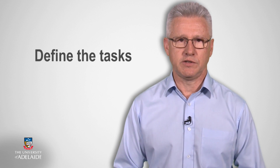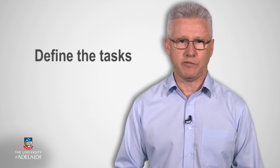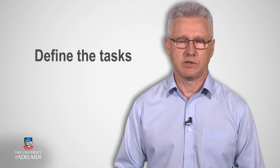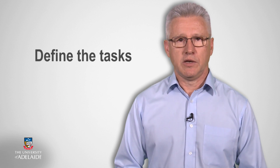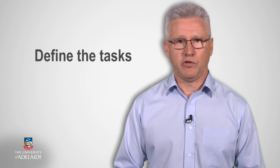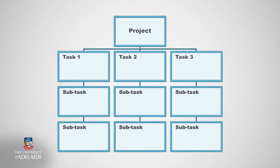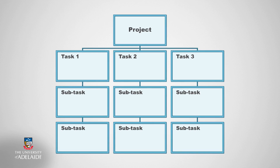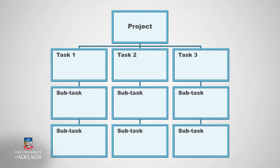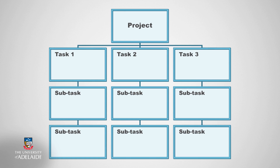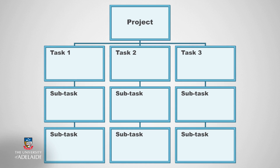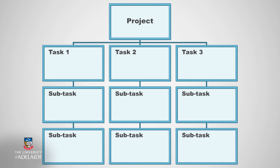First, you need to define the tasks that need to be performed to produce the project deliverables or outcomes. These actions must relate to the deliverables as determined in your work breakdown structure. If a task does not fit with the work breakdown structure, then either the activity is unnecessary or something has been left out of the work breakdown structure.